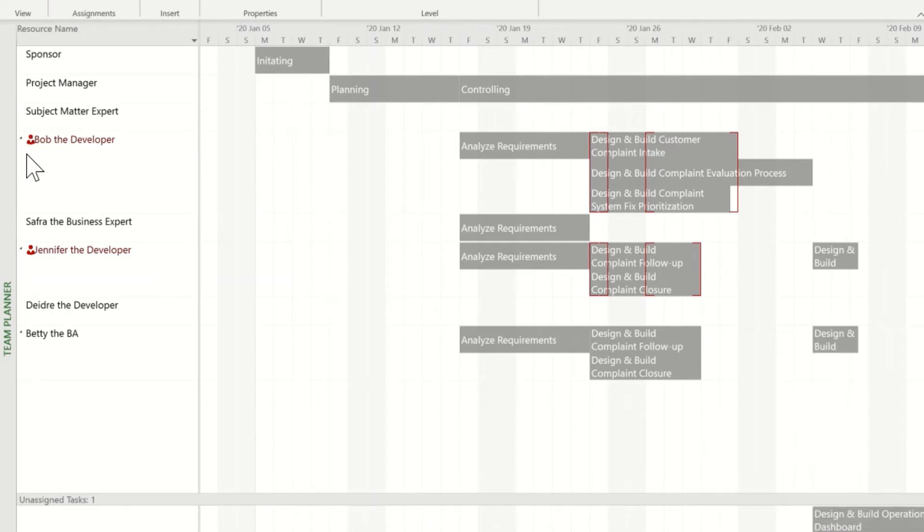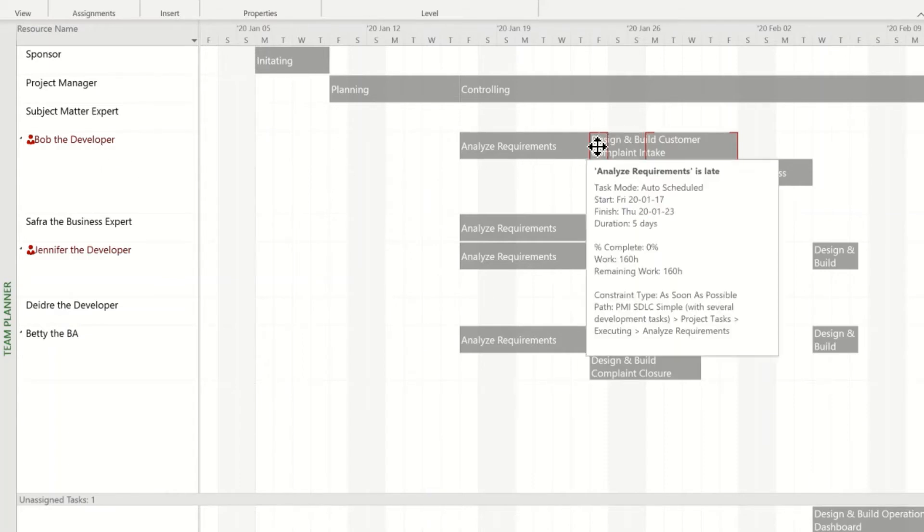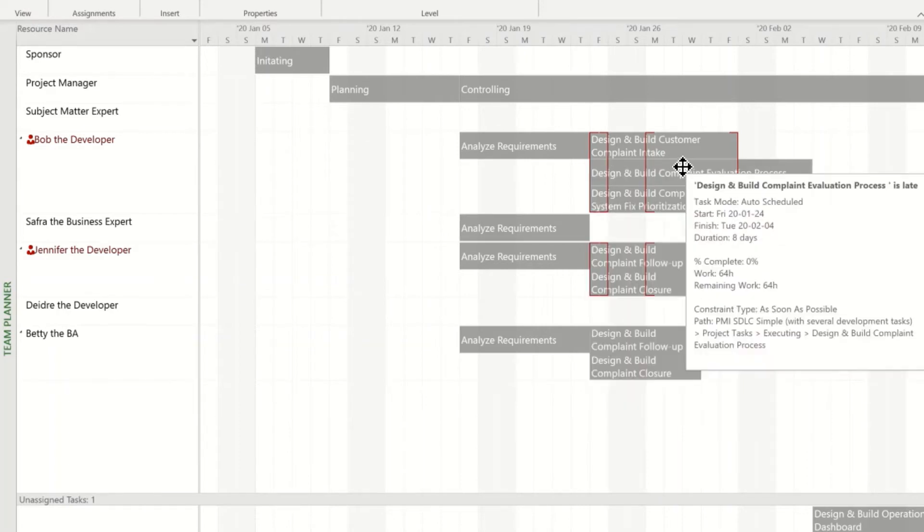We can see the red icons indicating over allocated resources, and we can also see some unallocated or under allocated resources that don't have tasks assigned to them. We can see that Bob is over allocated. We can also see when he's over allocated based on the work showing up within these red brackets. Let's fix this problem.